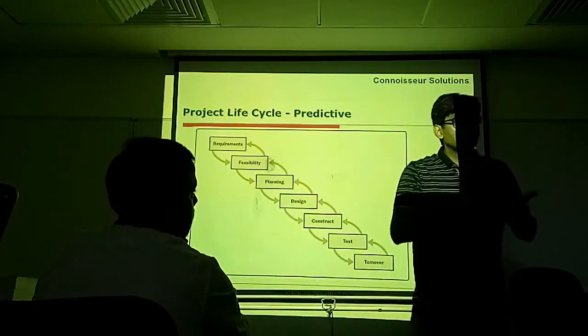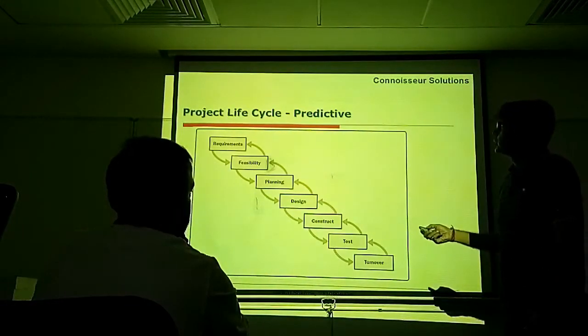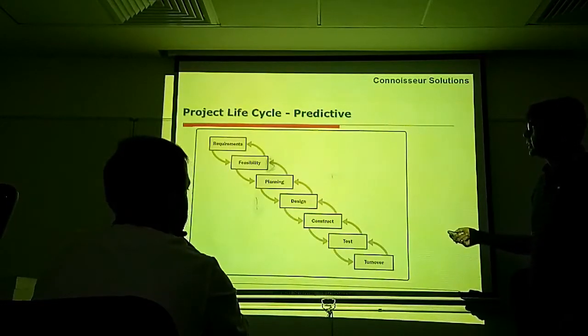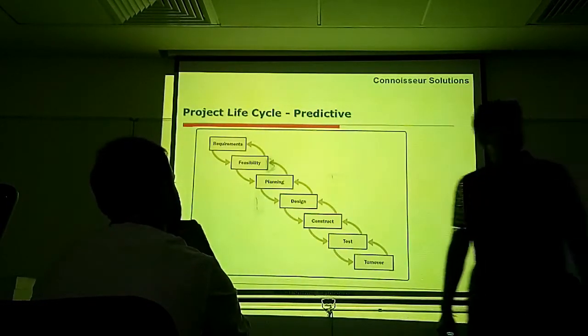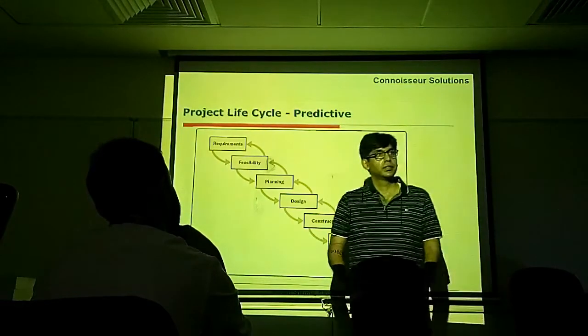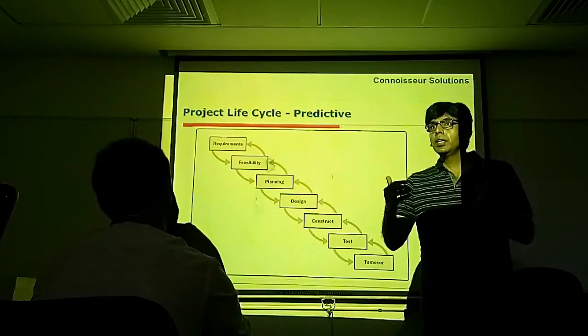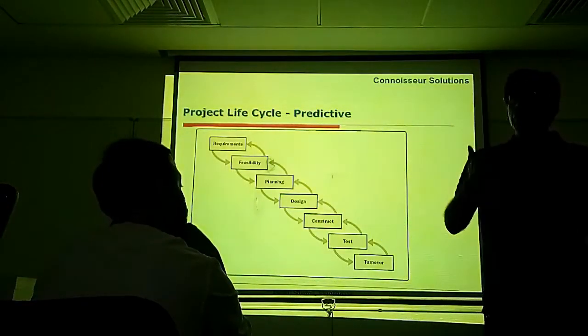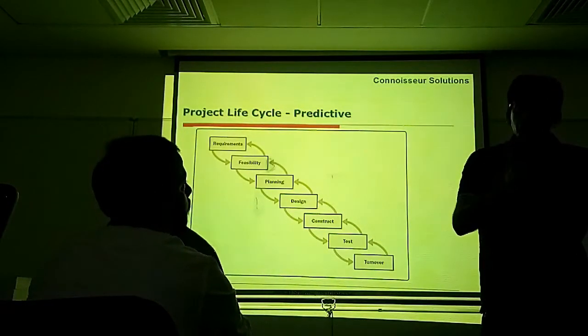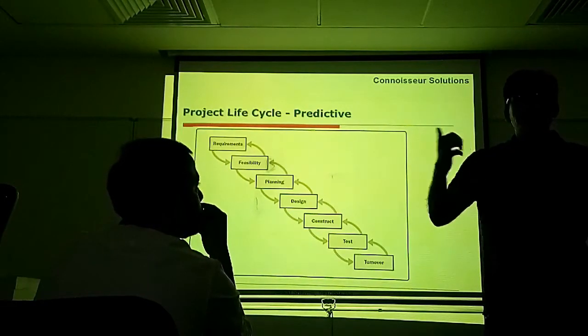Within the same delivery stage we can have requirements, feasibility study, planning, design, test, and turnover. So generally if the project is small and it's a low complexity project and we know what has to be done from start to end, we use predictive life cycle.